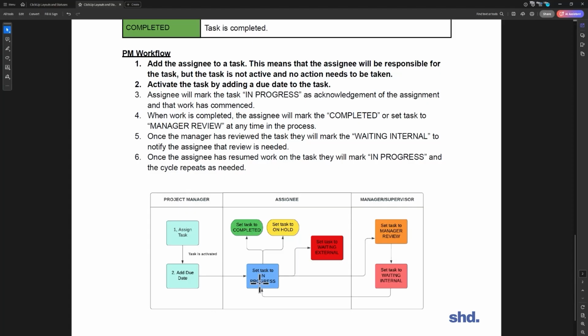But let's say we're working on this task and you're waiting for the client to get back to you because you don't know if the client wants to do Dr. with a period or write out doctor the whole way. That's a ridiculous example. But the idea is that if you're waiting for something from the client, or if this is the example where we are going to update the client's staff page and the staff page has images and you can't do that until the client gives you the new images, that's waiting external. Nothing you can do. So what that says to me as the project manager is this is due for Friday, and you're waiting external. So obviously that means we'd like to have it done Friday, but we're waiting for the client. I know that you can't do anything about that if we're waiting for the client to send us the information and they said they'd have it.